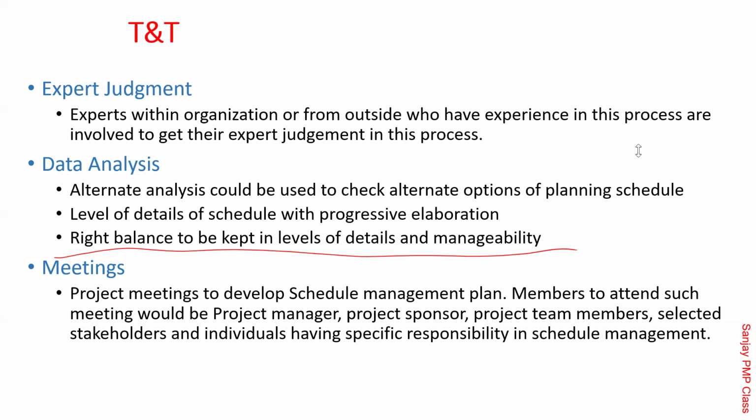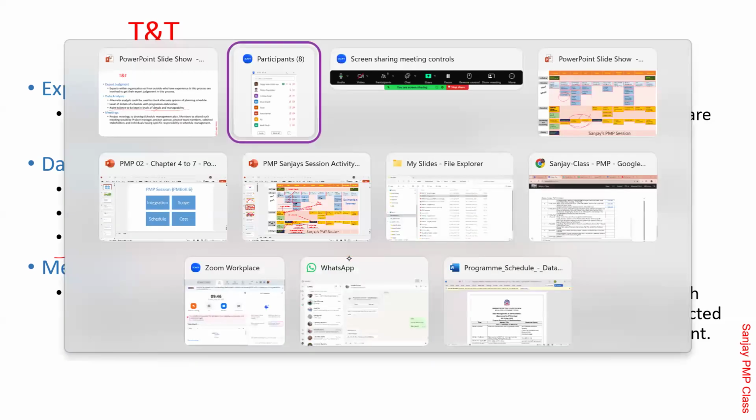So that every half day they will come back and report what they have done, and you will assign it for the current week. I mean, if you do it for the next week, it will become a problem. When you go into the next week, make it at a 4 hour level. Now that's manageability versus details. Now, what is happening? The more and more you try to go into detail, manageability becomes difficult.